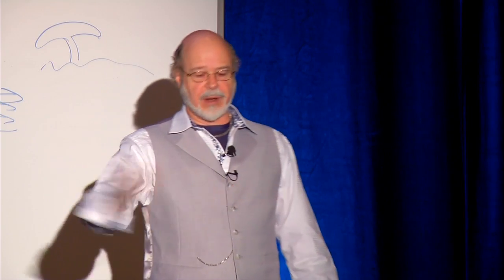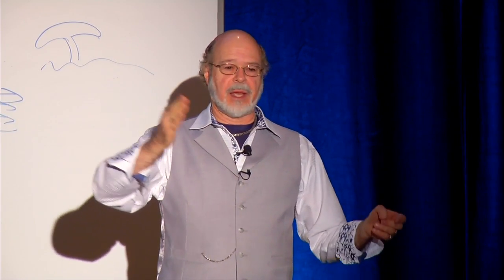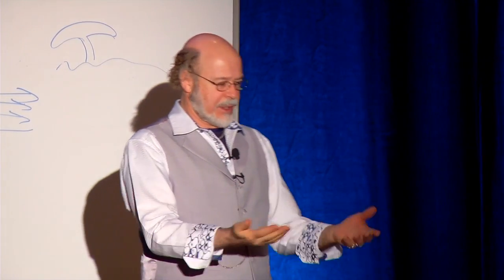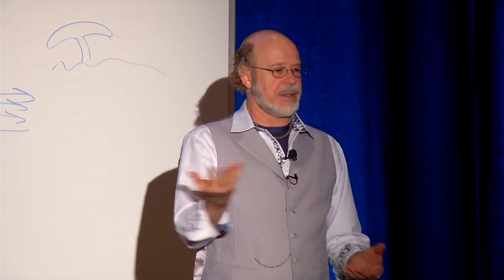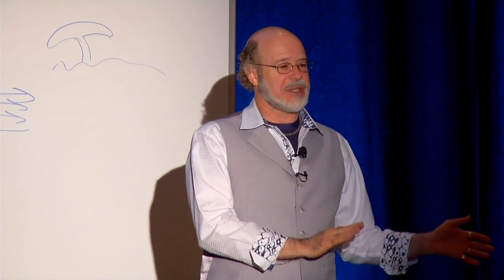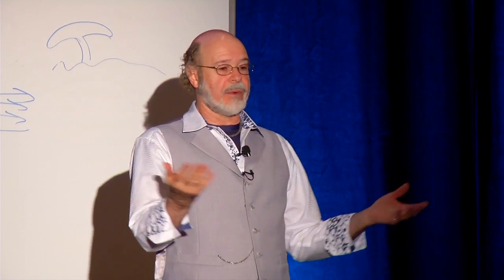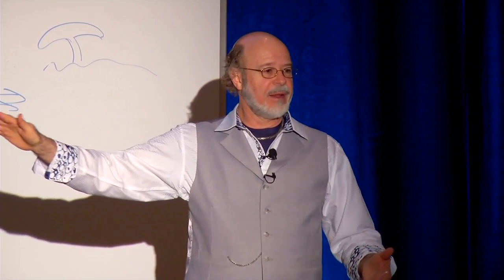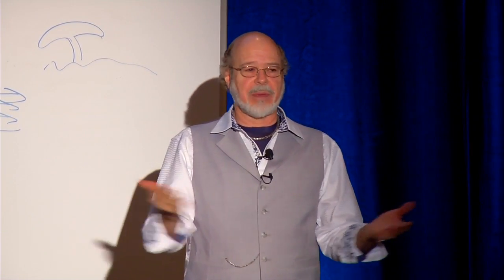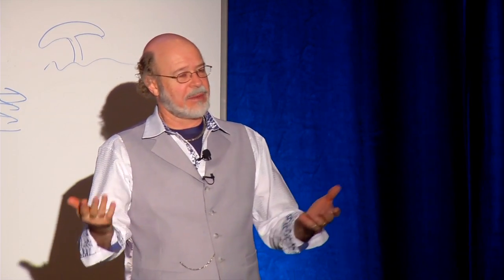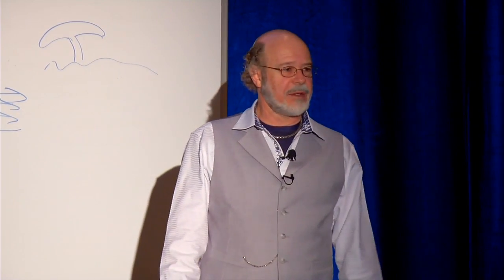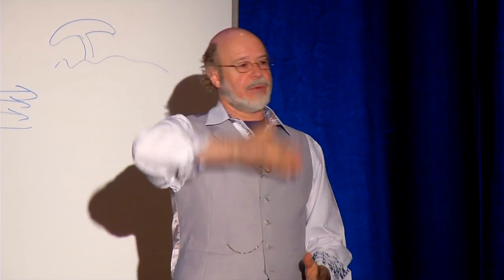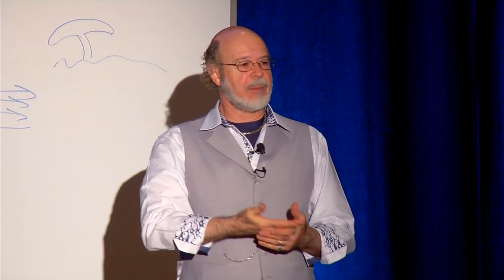We take our projects through the whole process, and I get to see the CA guy coming along and saying, well, they've sent this in and they say they can't find this material. Sometimes I know that's not true, and sometimes it turns out, wow, the manufacturer was bought by somebody else and they renamed the entire line. Products may be exactly the same, but you can't find them anymore because the information's gotten scrambled in the industry.